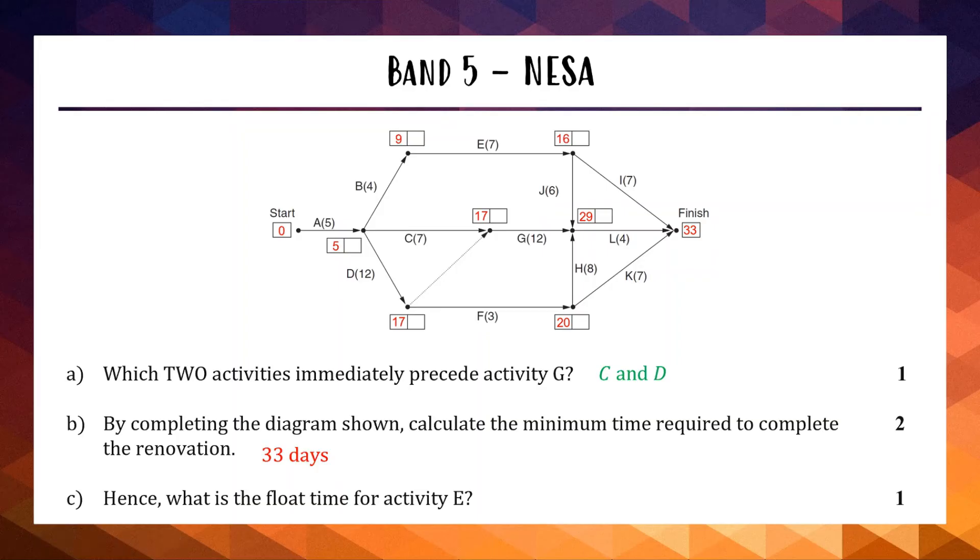Part C is the band 5 part. Part C says hence, what is the float time for activity E? To find the float time for activity E, we need to know what the earliest start time is and what the latest start time. The float time is the difference between these two numbers. It's how much spare time you have. To do this, we have to do what's called backwards scanning, which is a bit tougher. Backwards scanning, we're doing the same thing, but we're in reverse. We're going backwards and we're subtracting numbers. We're always trying to make our second number as small as possible.